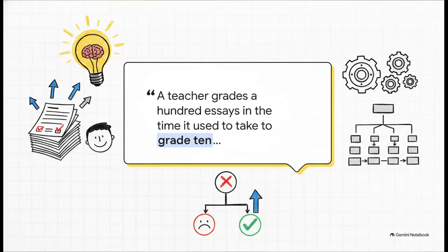Now, every epic has a stated goal, and this brilliantly illustrates how a single epic goal acts as the ultimate tiebreaker. This quote here is the goal for Epic 14, which is AI grading. Notice how it doesn't just describe a feature, it describes a concrete change in a user's life, along with a strict constraint. When an engineer is deep in the weeds of a ticket and they're unsure if a certain edge case matters, they just look back at this sentence. If a coding decision makes the sentence less true, well, it's immediately the wrong decision. It's a fantastic guiding light.